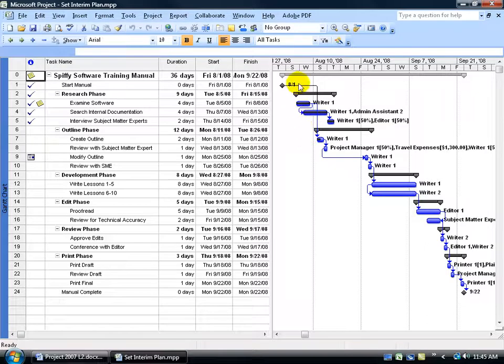For example, let's say on August the 7th or so I set my first interim plan. I take a copy of my actual start and finish dates. I can take those and compare them against my original baseline plan. You see, I didn't have too far out to go to compare what's happening so far, just a little section of time here. I can go out and set a second interim plan here, a 3rd, 4th, and 5th, again up to 10, and I can compare not only against the original baseline, but also the differences between those interim plans, or between those different points in time.